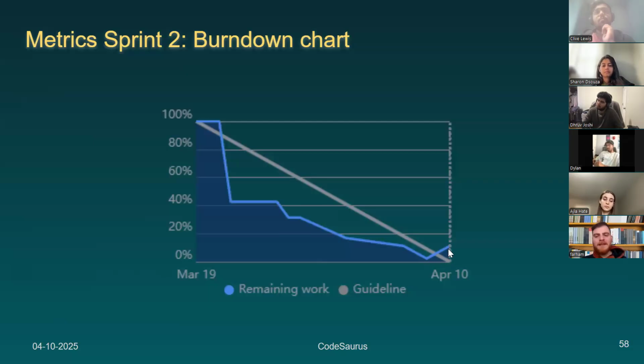But towards the end, as you can see, there is an increase in the user stories and the points that we assigned. This was because we did complete a user story towards the end. However, it had a lot of errors, so we had to go back and put it into validation because it needed more work to be considered actually complete.